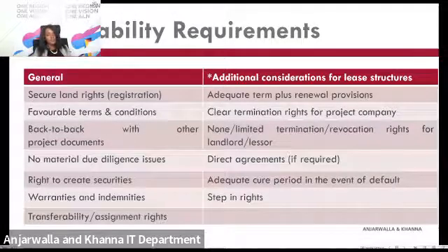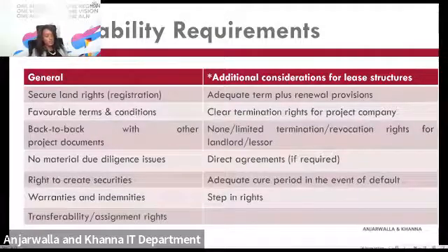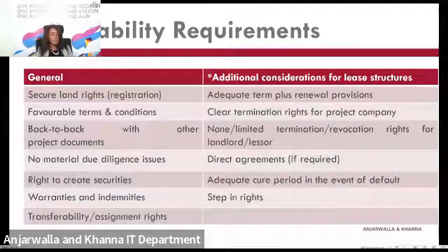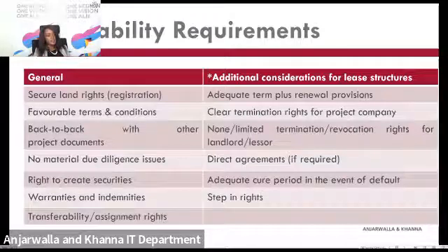Then next we look at the bankability requirements for project land. So bankability basically refers to the basket of issues that must be ticked off in order for a project to reach financial close. Some of the things that generally apply to all types of projects, whether they fall in the infrastructure sector or the energy sector, are, A, the project company must be able to show that it has secure land rights, that they have been registered, and that there's no third party who can come and claim or contest the use of that land by the project.